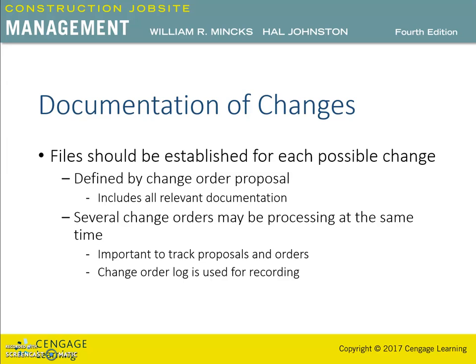A clear knowledge of the responsibilities of the process helps speed up the system. Recording the dates of the processing also is necessary in claims procedures. Project meetings should involve updating the log, resulting in an updated version of the change order log being distributed within the meeting minutes. Therefore, the change order log is very important for the management of change orders.